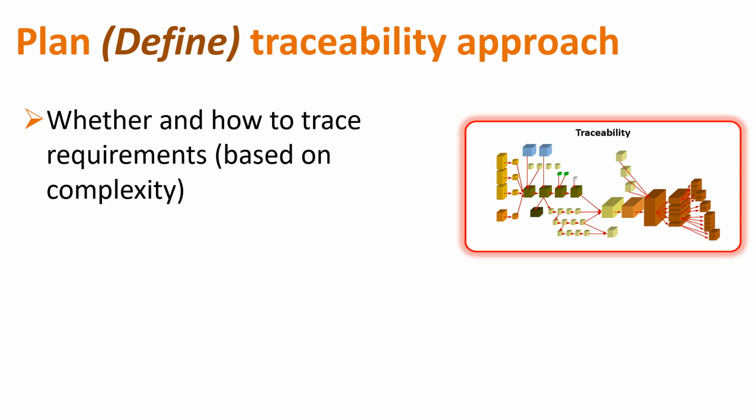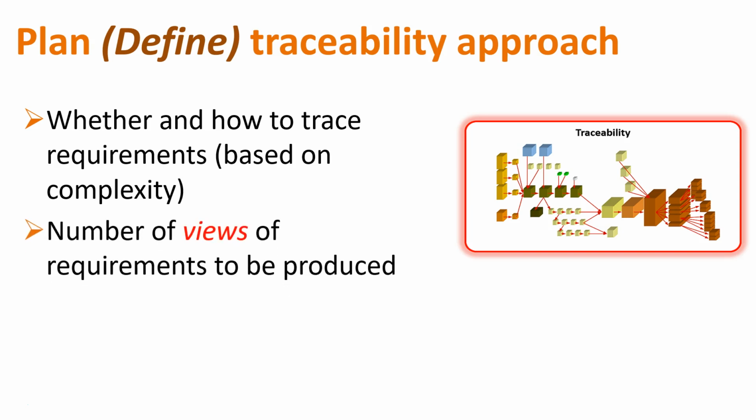But if you're approaching traceability from a change specific perspective, then if you're working on a change that's not really complex, traceability gets too expensive for value. The value is not there. But if you're doing a really risky, high complex change, traceability can become invaluable. It's a very, very good risk mitigator. Okay, so first you've got to decide, am I going to trace? Based on the complexity of the project or the change will probably determine that for you.